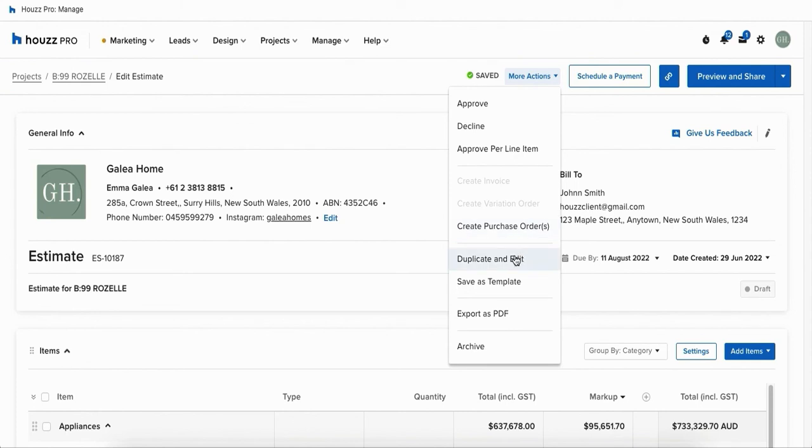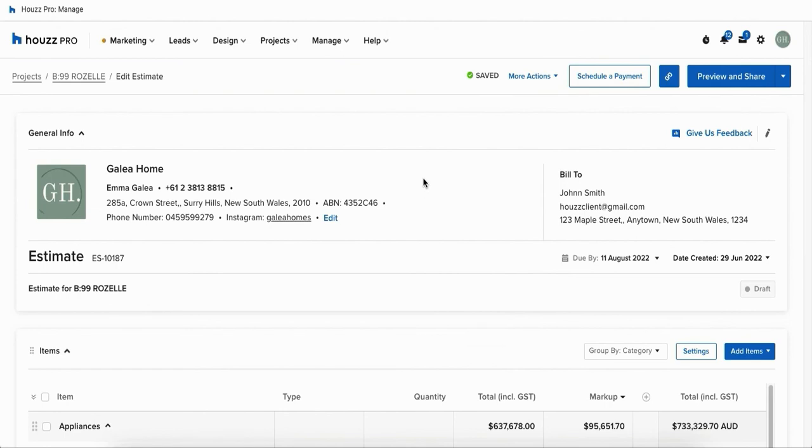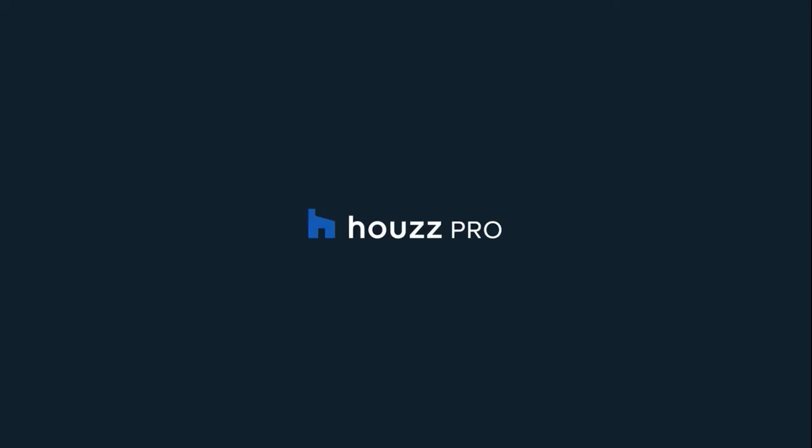At the very top of your document in the top right hand corner you've got your more actions. So this allows you to approve or decline the document on the client's behalf. Once the document has been approved you'll be able to create an invoice or variation order. You can create purchase orders. You've even got the option of duplicating and editing your estimate and saving it as a template. So that way next time you go to create a document you've already got this layout ready to go.